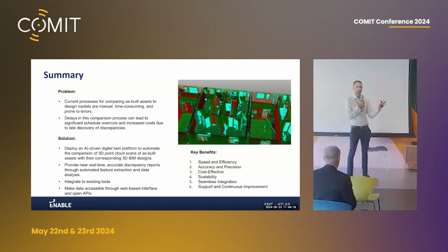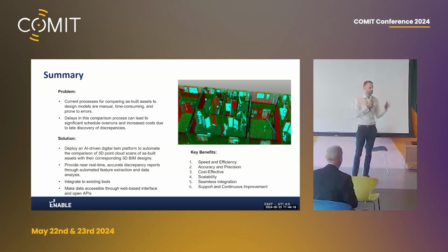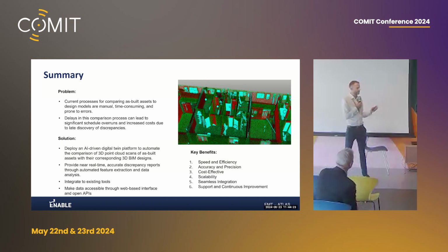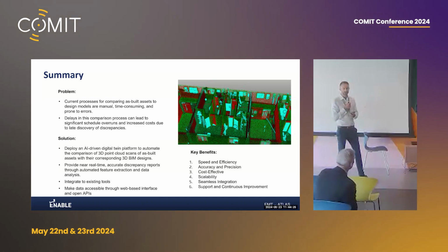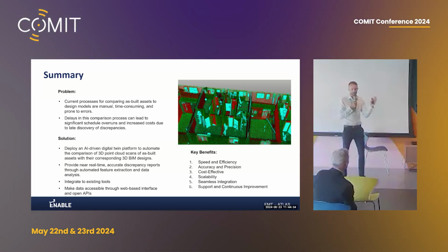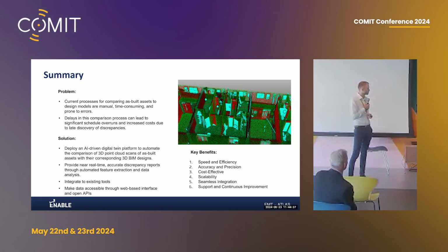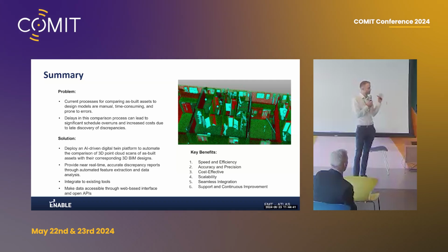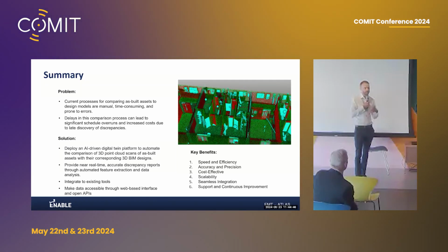If something takes 4 months to do, you're not going to do it that often. If something takes 4 hours, you can run that as frequently as you like. As the technologies are developing, our hardware, our data capture tools, they're getting way more advanced. It means that you can do a survey once a week if you want to. And now that the automation of the processing is also in place, you can run that every week and you have that progress tracking throughout. Obviously, it's a lot more cost effective and scalable. These manual issues, if you're going through a building with 150 rooms, you're going to miss things. You're going to make mistakes doing it manually. And again, this will help draw the attention to those key areas of focus.